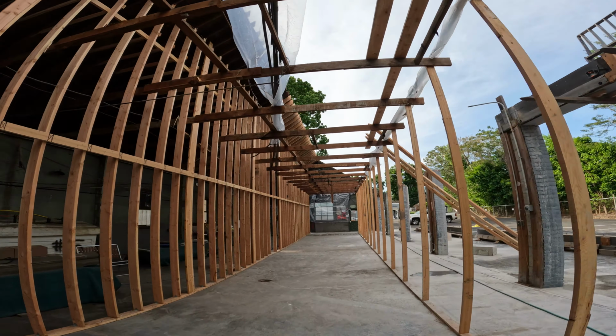But yeah, so when I redid my new Gantt chart, I have us finishing July 12th, which maybe was a little aggressive, but we'll see. But anyway, my metal guy said he's coming tomorrow, Saturday, to start drilling out the W beams. The reason he has to drill those out is he puts clearance holes so that we could put the wood packing in.